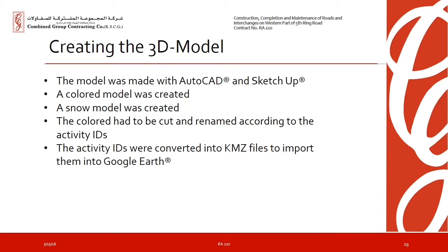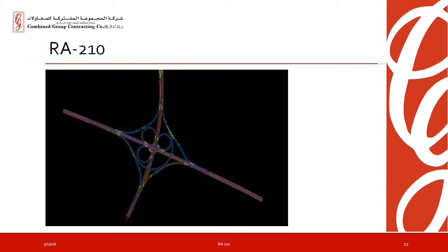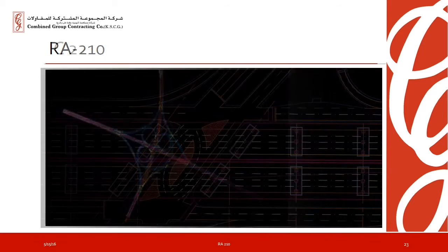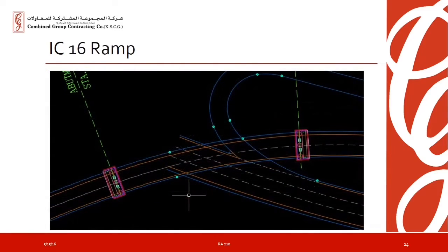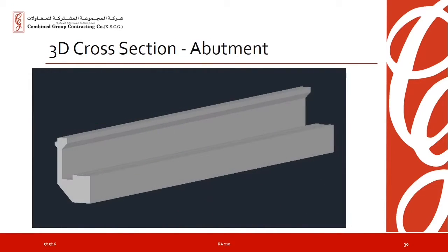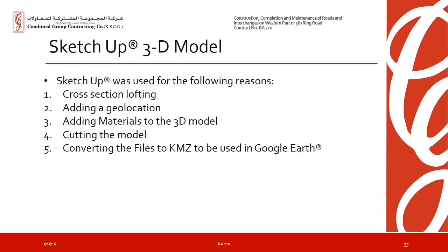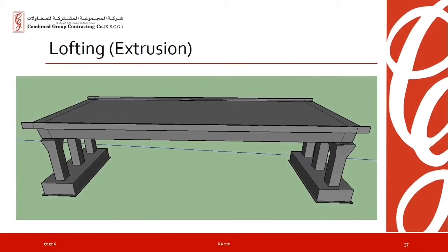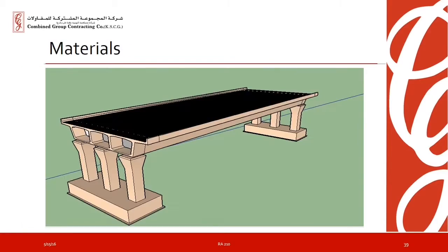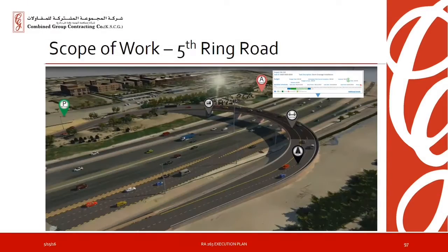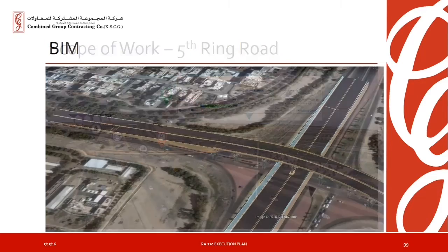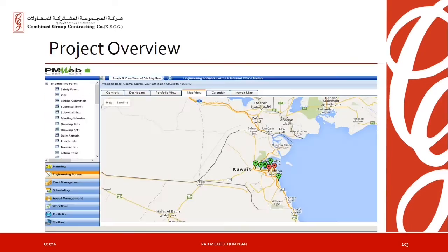Our team was challenged with the task of modeling in 3D the three current highway projects that we have, and they started by importing AutoCAD 2D drawings into SketchUp, where they utilized its tools to build a full-blown 3D model. Once the 3D modeling was completed, it was exported to be read by the web-based 3D viewer, and we developed some graphical icons that we linked to the various elements of the project. Once those pins are clicked, an information bar comes up with the detail from the database that shows the financial and the schedule health of that particular element.